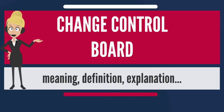Decisions regarding whether or not proposed changes to a software project should be implemented. In short, any changes to the baseline requirements agreed with the client should be taken up by the project team on approval from this committee. If any change is agreed by the committee, it is communicated to the project team and client, and the requirement is baselined with the change.